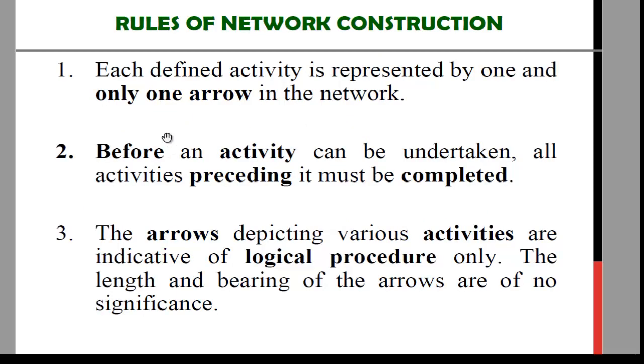Now, there are some rules for the network construction, that firstly we need to have only one arrow between the two activities. There can't be two arrows, okay? So that will be confusing. So there will be only one and only one arrow between the two activities. Second, that